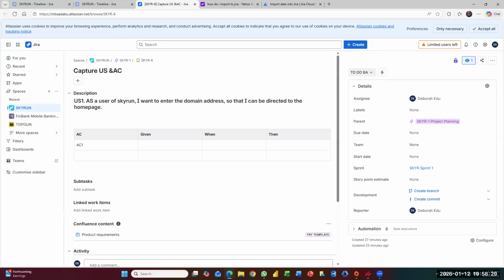And so our understanding is we shouldn't be doing that on Jira because the epic should be like a medium chunk of the high level requirements. If we take, for instance, a web portal enhancement, say for HSBC, we should be saying there is a chunk of that enhancement that is access management, for example, or content management or reporting.